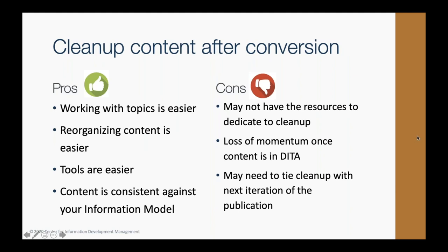So here are the pros and cons of cleaning up your content after the conversion, right? It's easier because the content is already in topic form. I always recommend that if you go the post-conversion cleanup route, which is the route that all the projects I've ever been involved with have gone, that you divide the cleanup into two buckets, right? Quality audits for getting yourself to that minimal viable product so that you can push your content out to your delivery platform in the new format, and then stuff that requires rewrites of some kind or analysis of some kind.